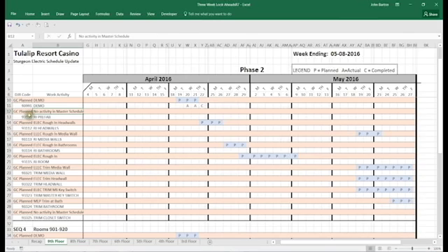However, what we did was we created a code, and it's the 9th floor, quadrant 3, work code 110, and that's the rough end prefab. So that's really when we get further into the job, if we can find ways to do prefab that will save us work over here, here, and here, then we would start charging our time here, our actual work going here, so that we could cut a couple of days off the schedule down here.